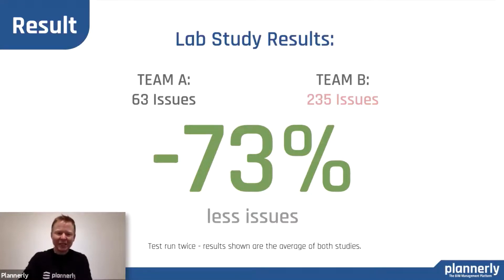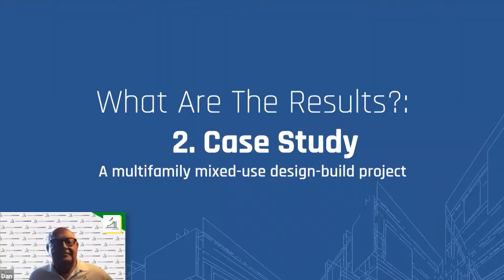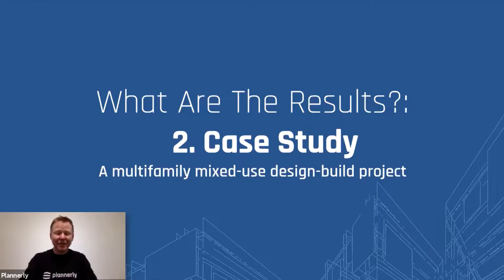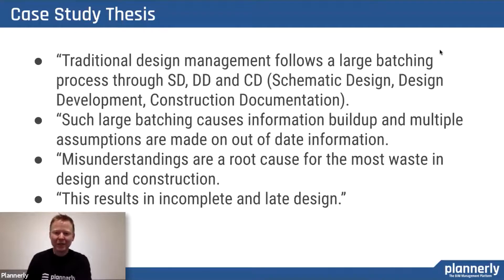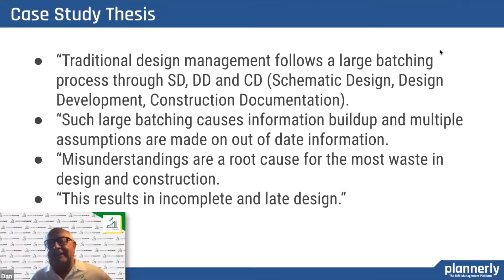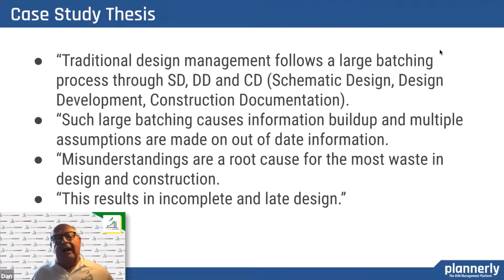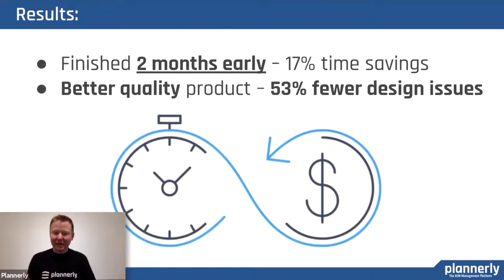Dan and I had the opportunity to run this in real life as well. The second case study was a multifamily design-build project where we had the perfect opportunity — two projects running at the same time with the same teams — so we could implement this workflow on one and really study it. The owner's hypothesis was that traditional design management follows a large batching process, making information build up with lots of out-of-date assumptions. Misunderstandings then become a root cause for most of the waste in design and construction, resulting in incomplete and late design. The theory worked out — we didn't hit the 70-odd percent from the lab, but 53% on a real live job and two months early was pretty good.